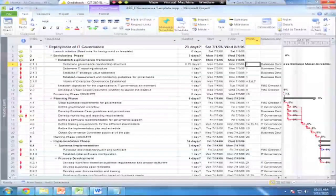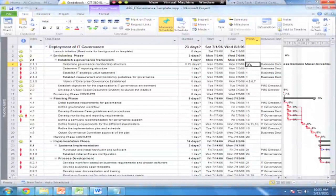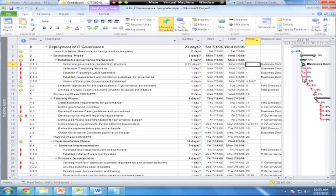Other parts we need to look at here are some of the default columns built in: predecessors and resource names. Looking at the model, we can see things are linked using predecessors. Predecessors are linked based on the row numbers in the left-hand column. So putting in a predecessor of 1 on a task means that on the Gantt chart, task number one has to be complete before the next one can start. This is called a finish-to-start relationship, and that's the default behavior.